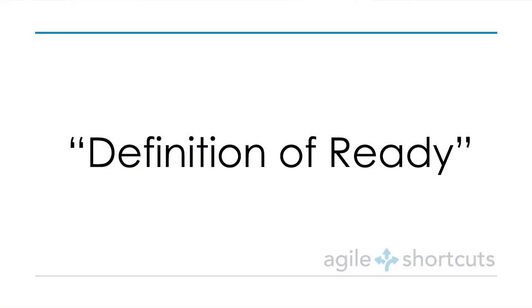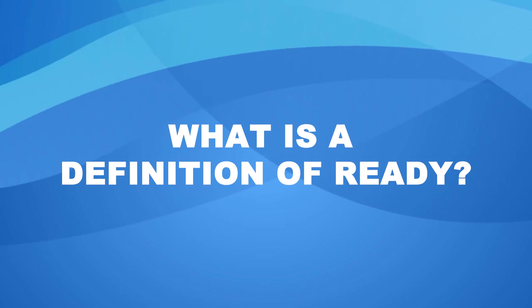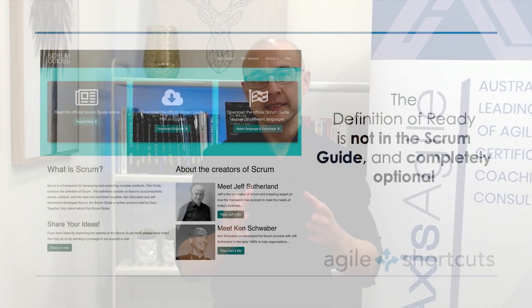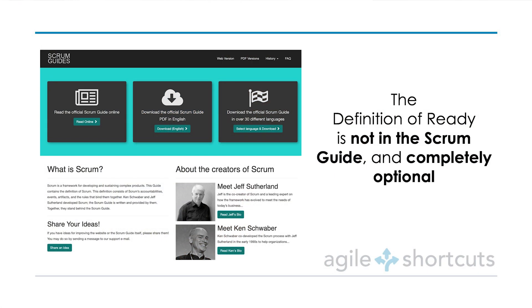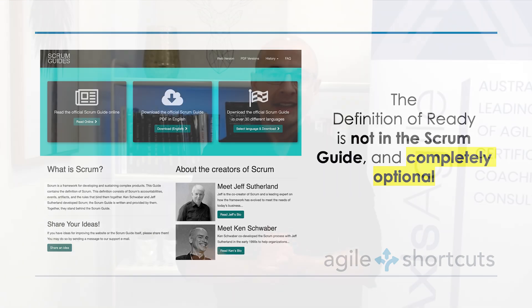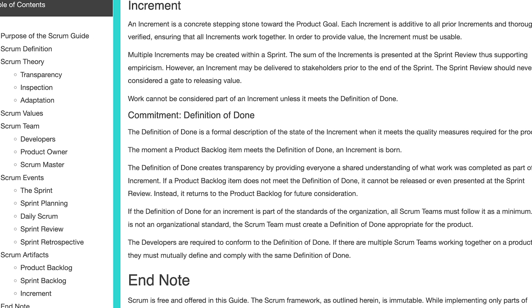In this video, let's take it a step further and look at how we can improve our product backlog refinement process through using what is called a Definition of Ready. The first thing you should know is that it is not part of core Scrum — there is no mention of a Definition of Ready in the Scrum Guide and it is completely optional.